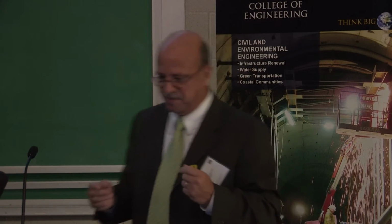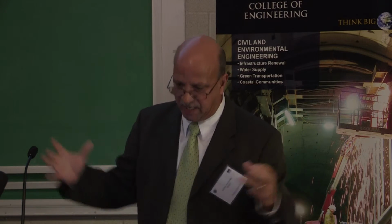But we had our problems. The first problems that we started encountering is that we just had different readings. We would get their readings and our state readings would be different. And the problem with that is Sekonic has such a variance in soil throughout. It could be 10 feet apart and you get different readings. So basically communication, working together with this team, taking split samples, sharing test results, working together, resolved that problem pretty quick.